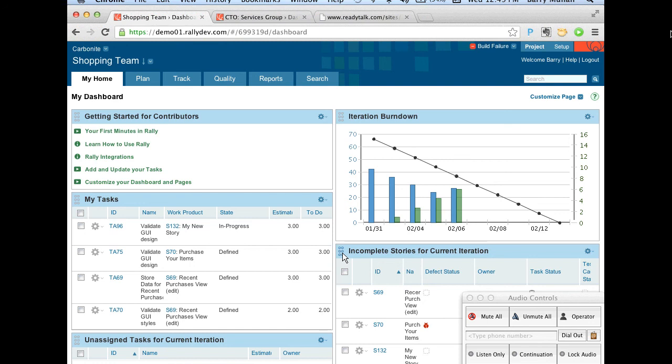A minor trick, but I was brought up this way for many, many years: I looked at find/fixed rates, and I looked at lines to cross twice before I released, as an indicator of the health and the progress of a product. Not always true, but I'm used to studying how find/fixed rates cross and looking at those lines, and I haven't found where I should be looking for that so that I can see how that's going. Yeah. It was an old boss of mine that insisted on that, and through the years that's how I generally look at things. So anyway, that's a minor thing.